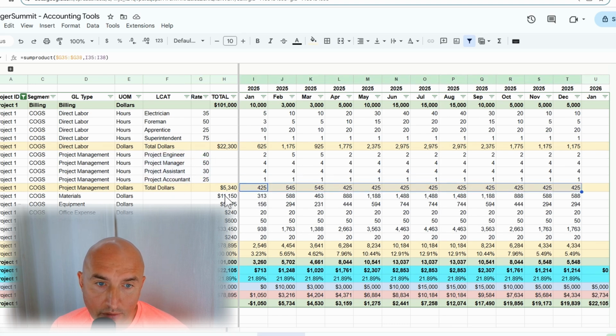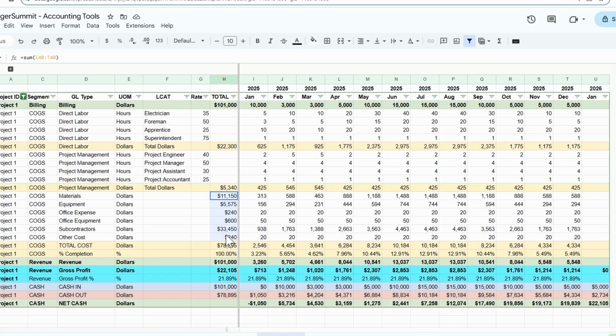And now you have to use your budget for other types of expenses and then spread that expense out. There can be multiple ways of doing it. Either you just do a straight line, or you do a relationship to the labor, or any other. And then in the end, you arrive at your total cost at completion for this project, which is essentially how much money you're going to spend to deliver the project.